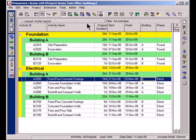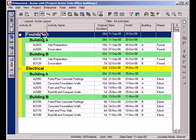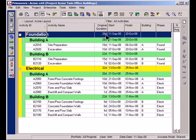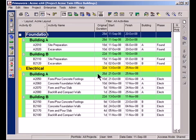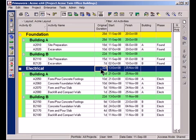There it is. Now my project is reorganized first by foundation, then by building. The advantage that this gives me is now I can see the total duration for all of the foundation work across both buildings. I can see that the total duration is actually 28 days and I can see that the total of electrical work is 32 days.